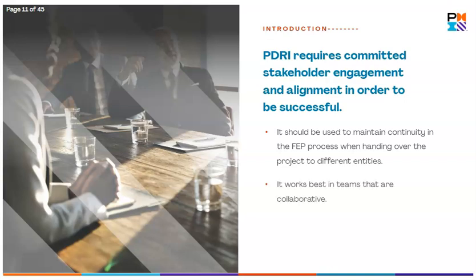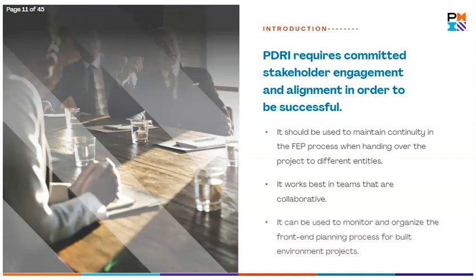The PDRI tool works best in teams that collaborate. If feasible, a neutral facilitator that is familiar with the tool and process should help leverage each team member's skill set. Project managers can use the tool to monitor and organize the front-end planning process for built environment projects.